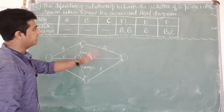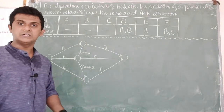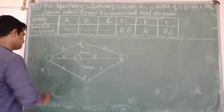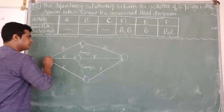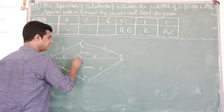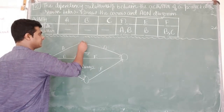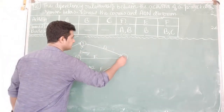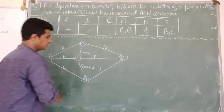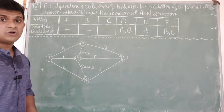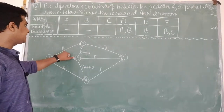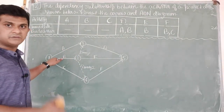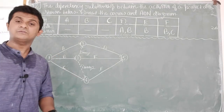This is our completed arrow diagram. Now we have to use Fulkerson's rule to number the events. This is our first event, then the second event, third, fourth, and fifth event. This is how you draw an arrow diagram — by placing activities on the arrows and naming the events using Fulkerson's rule. Thank you for watching the video.